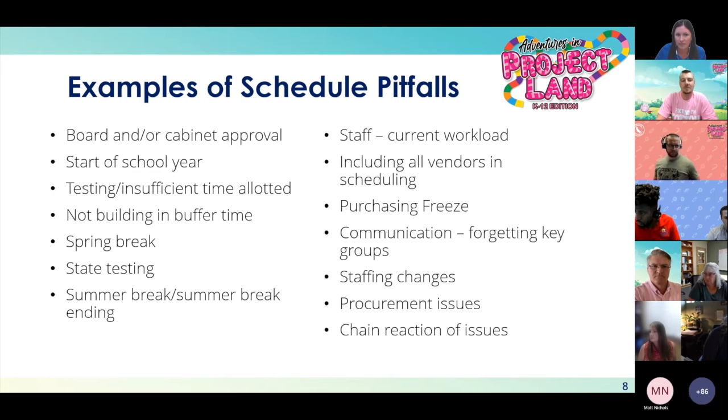The current workload of the staff. Staff will have other items that they're working on, and this can cause a project to stall or the schedule to get compromised. Including all vendors in scheduling. When creating the schedule, we need to try and include all vendors so everyone has input and can plan together. There may be issues or scheduling restrictions that need to be taken into account for everyone involved. A purchasing freeze. Districts could have a purchasing freeze. This can affect ordering and the supplies or materials being delivered on time.